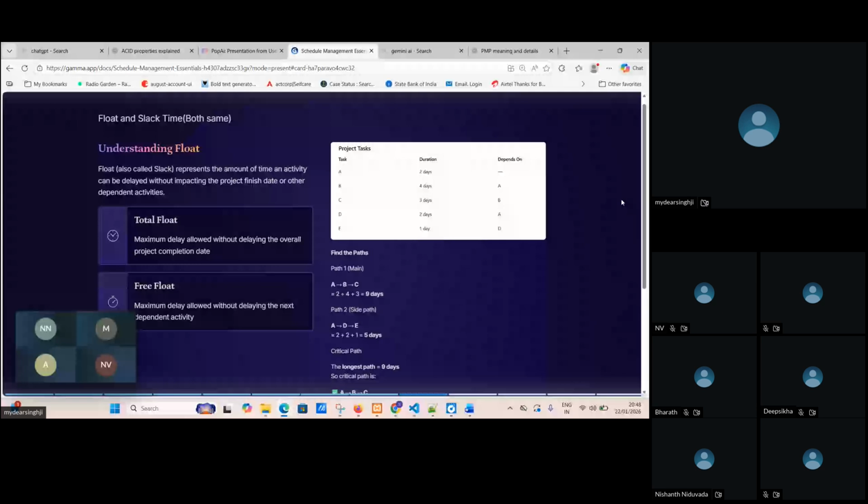If yes, then we are reducing 1 week, right? Parallelly, the UI team will complete the other activities, like the contact us page or about us page. Before that, development has already started, and we reduced 1 week of development time. So here we are making some float time for the team. Do you understand, or can I give you some more examples?